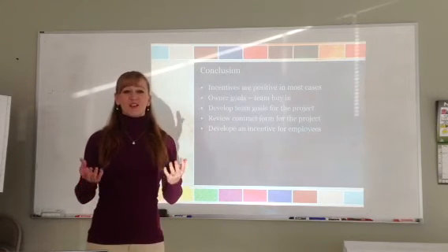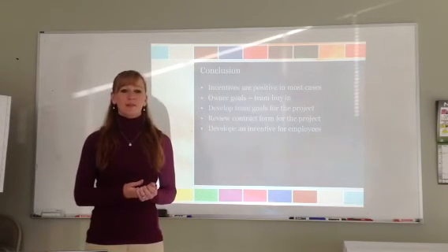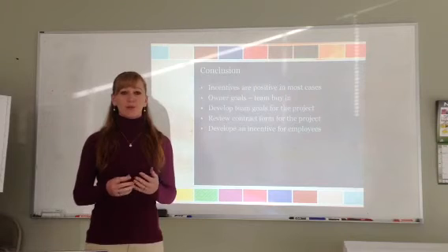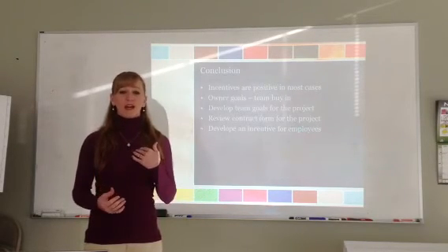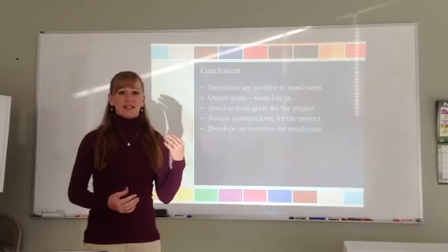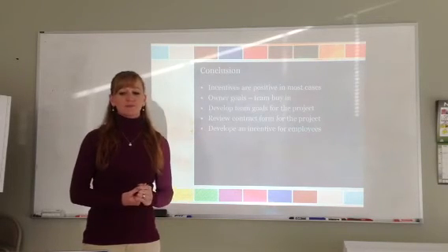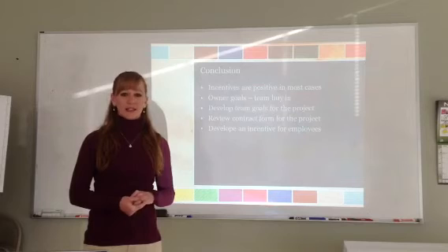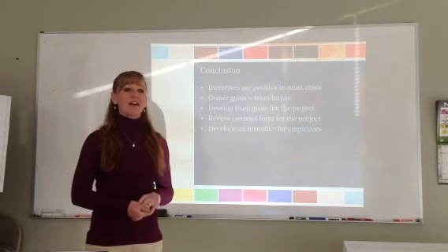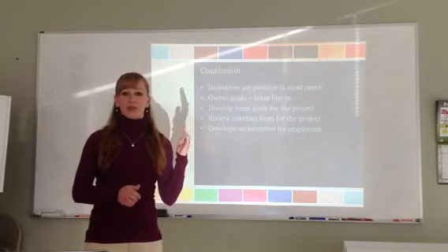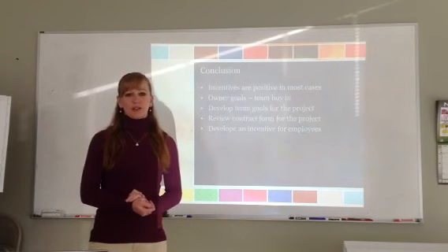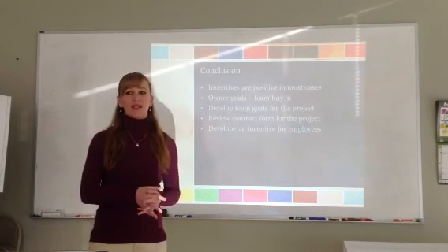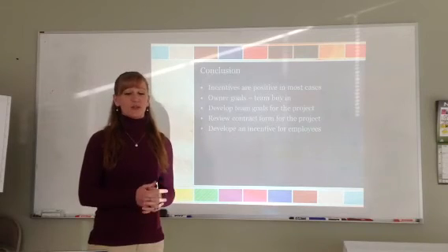So in conclusion, I know this is really brief and short, but incentivizing people and projects plays a key role in the end result goal. With my experience in Kansas City originally, we've had several projects where the owner has said, if you complete a month early, we will provide you a half percent of your fee as a bonus. And in some cases, that can equate to a lot of money.